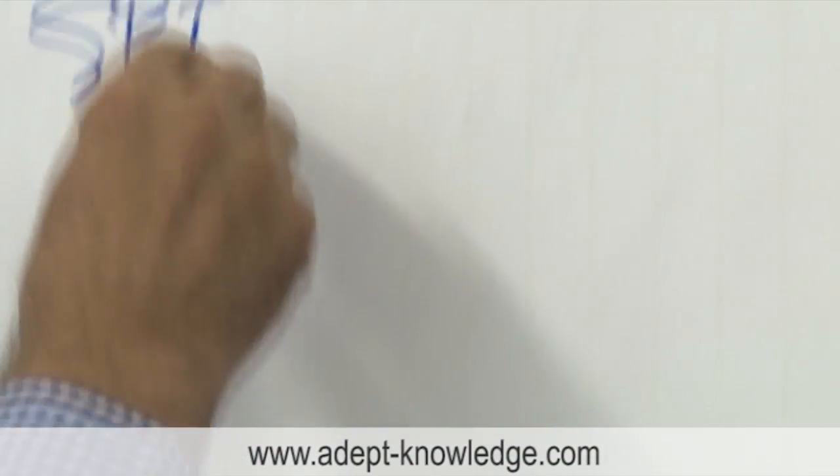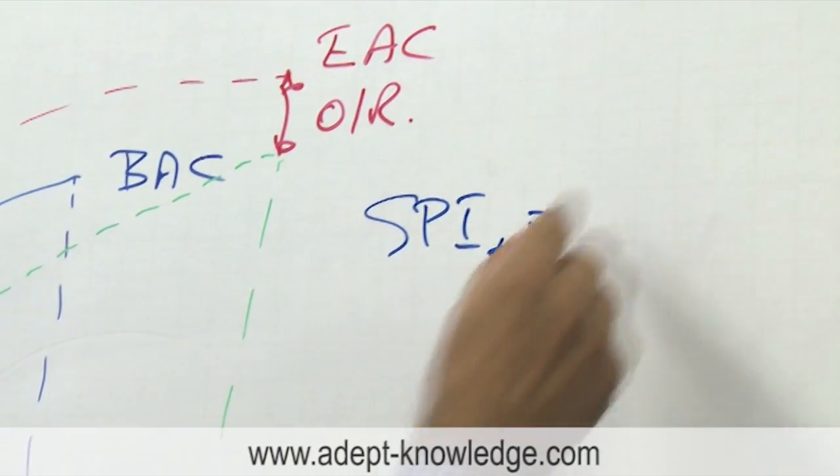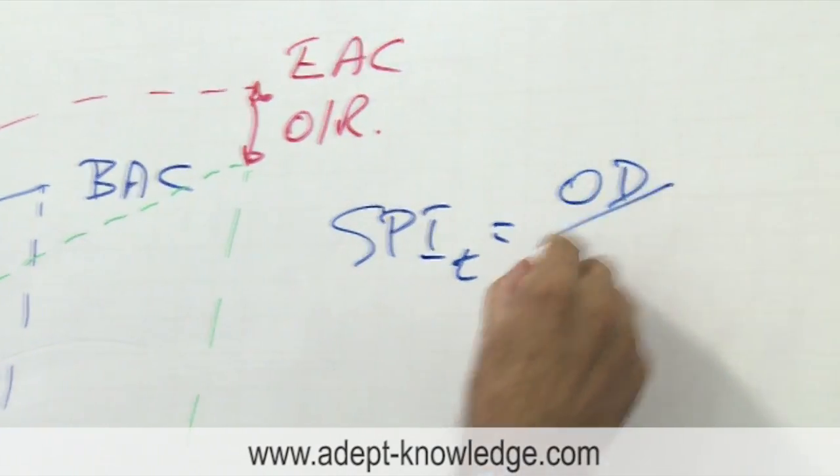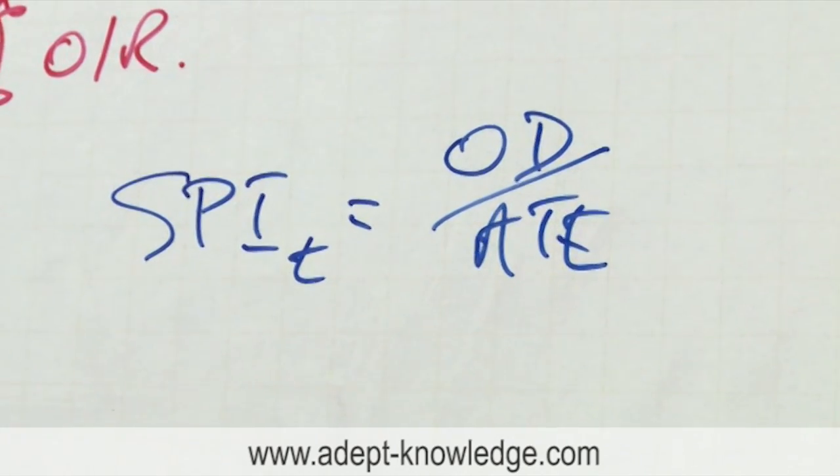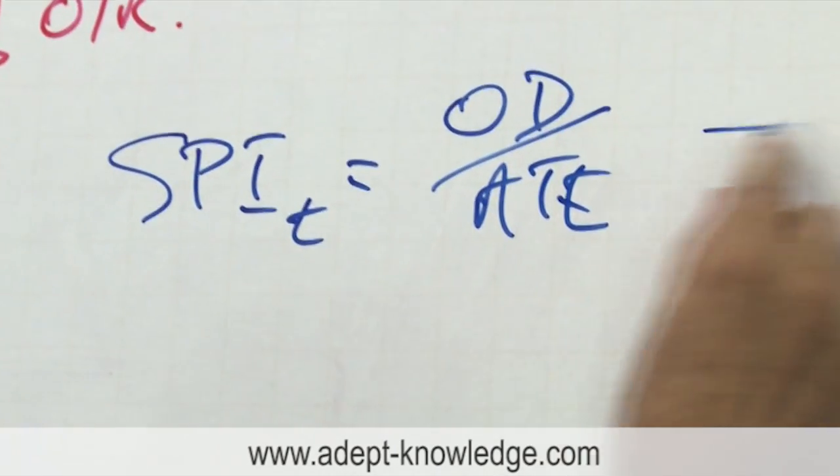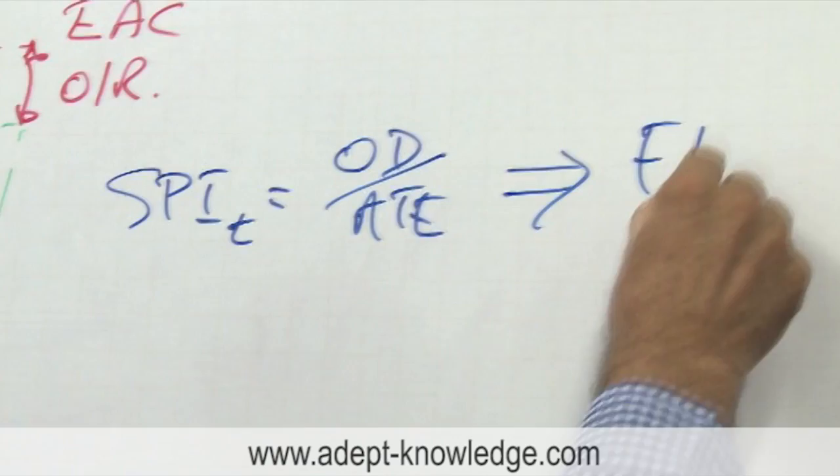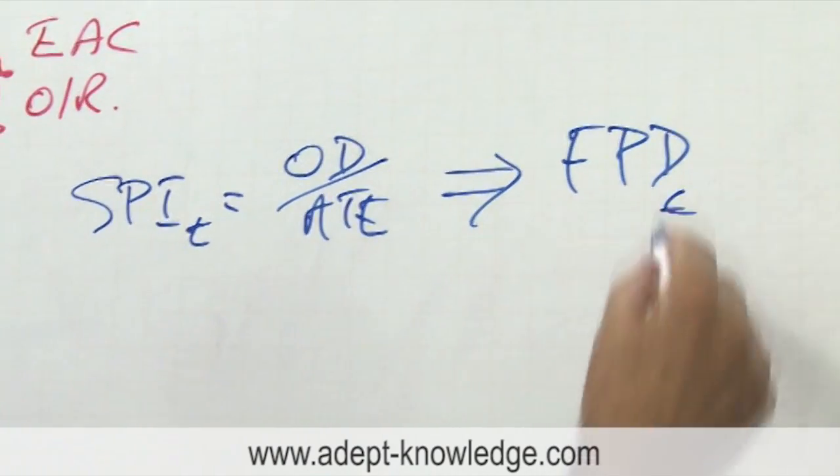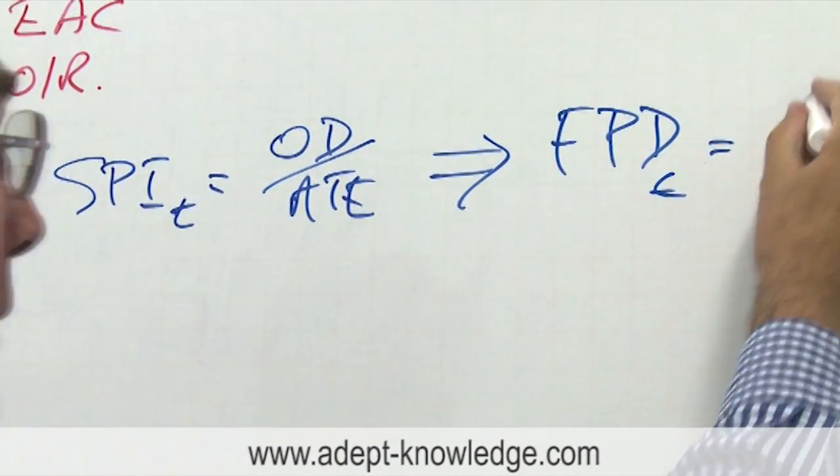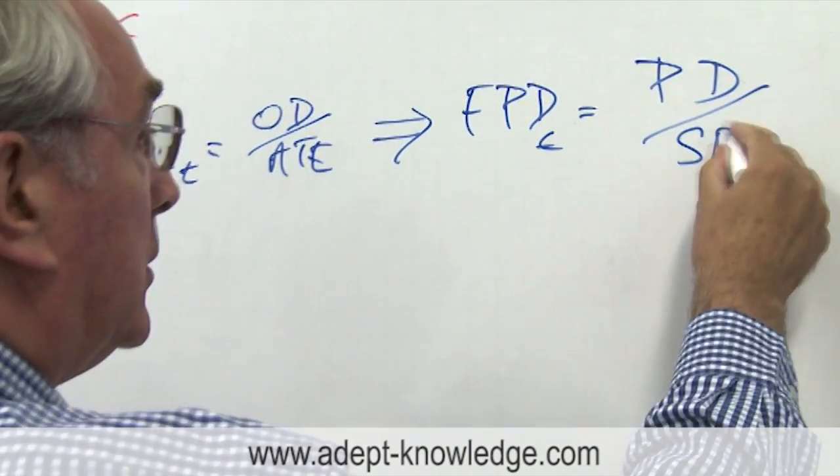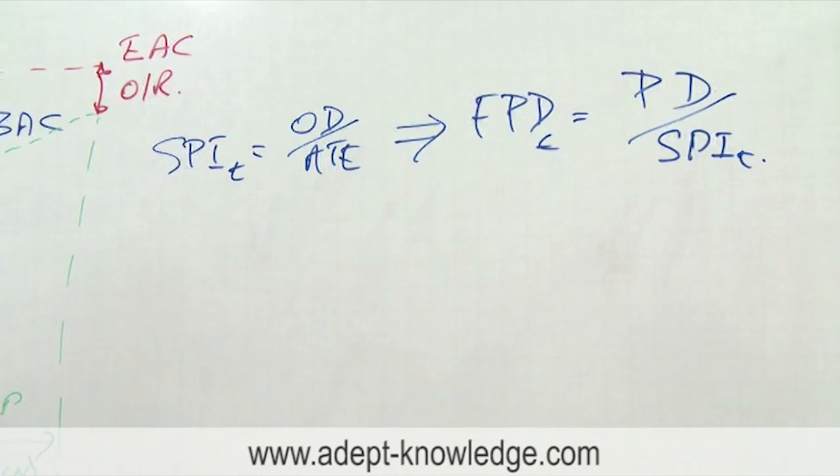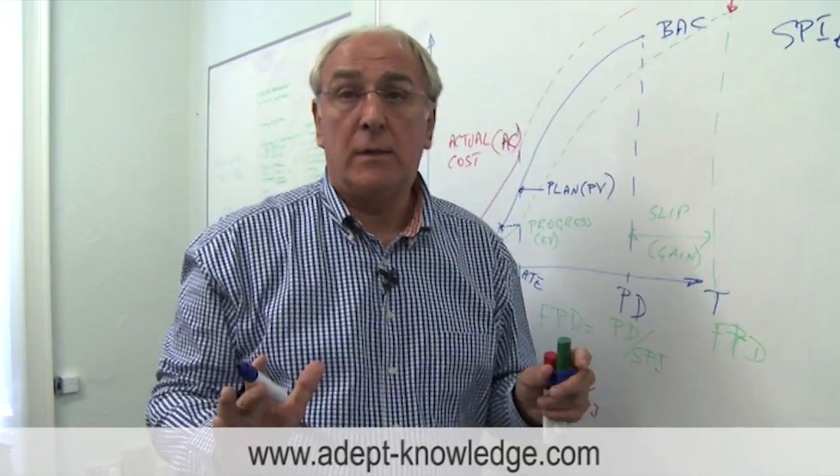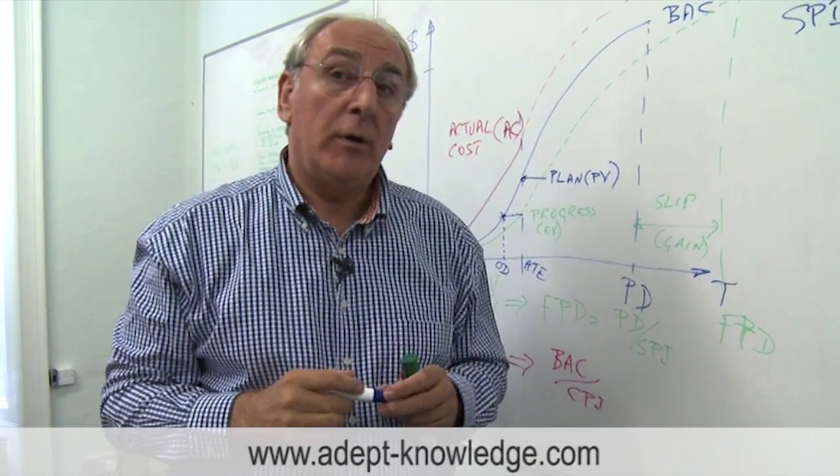The schedule performance index on time, SPIt, is calculated as OD divided by ATE. It's just a better version of that one. We can use it in a similar way and it implies that we can do a forecast project duration, this time with a subscript T, and it's similarly project duration divided by the schedule performance index time. That's absolutely red hot stuff and just perfect for forecasting where we're going on the project.